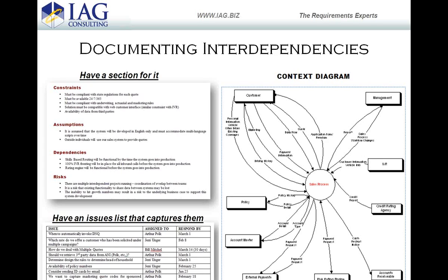Oh, this is really the issue of sales. Or we need to check on that project and determine if the scope of that project is touching on what we're doing over here. But you've got to get that picked up, because all those issues are really something that, from a project management perspective, you want to make sure you're connecting with. But more fundamental than all of this is the context diagram. Every single line on that context diagram is an interdependency. It either can be done or it can't be done. You can share information that way or you can't.